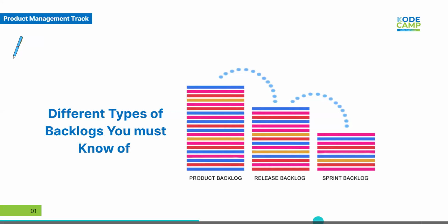Now you select these items from your product backlog, which is like the general place, and then you create a release backlog. Now that backlog might look something like, add card payment option, send money, fix persistent login bug, the things I've mentioned. These 3 stories here cover what your company said they needed the app to be able to do in the 2.0 release, right?